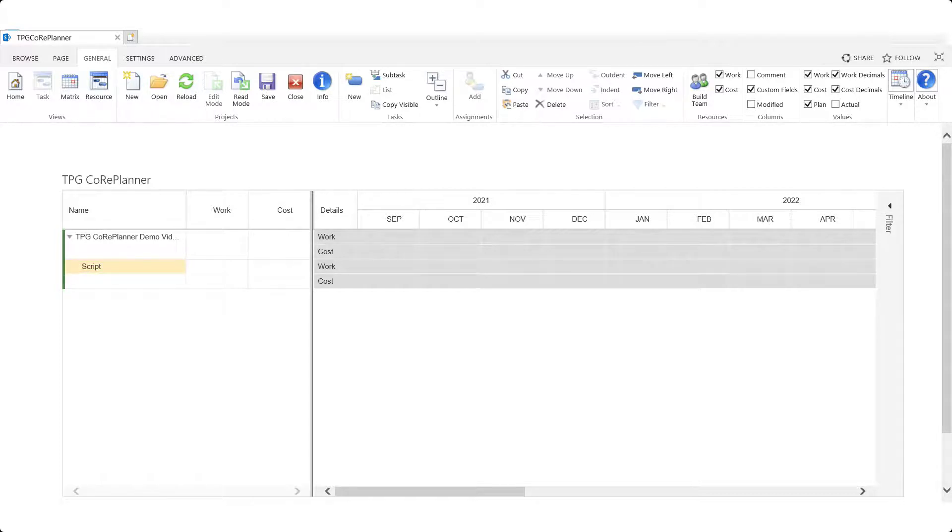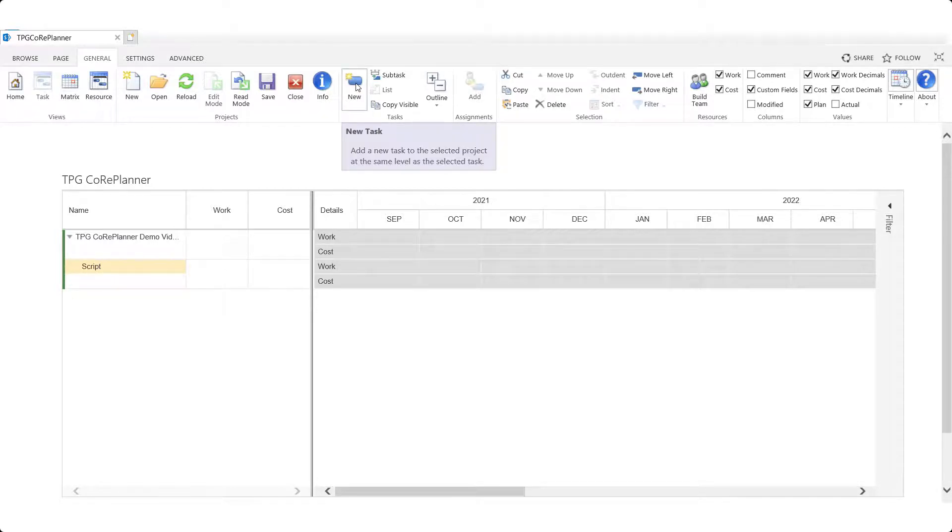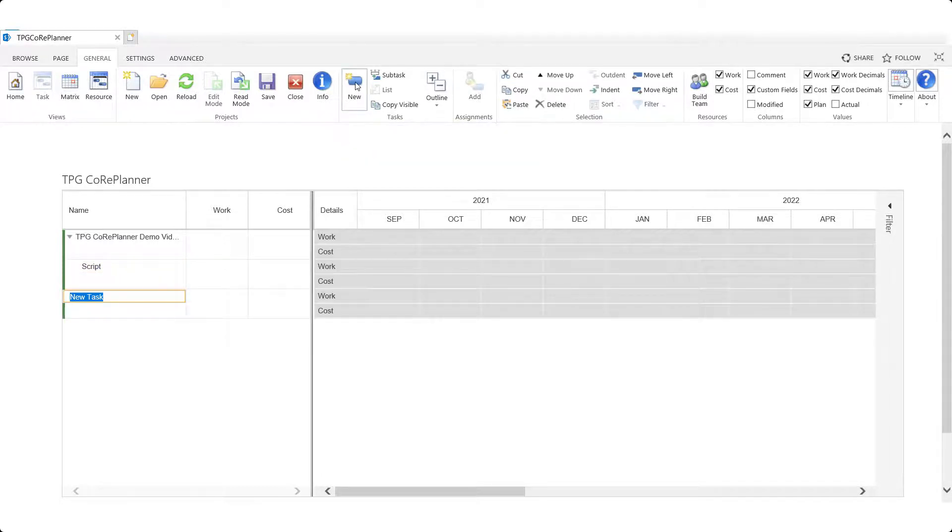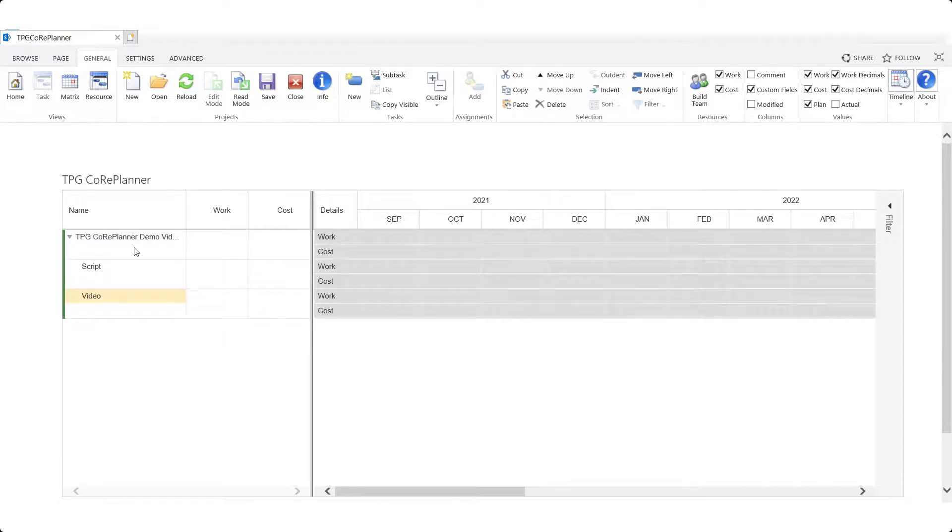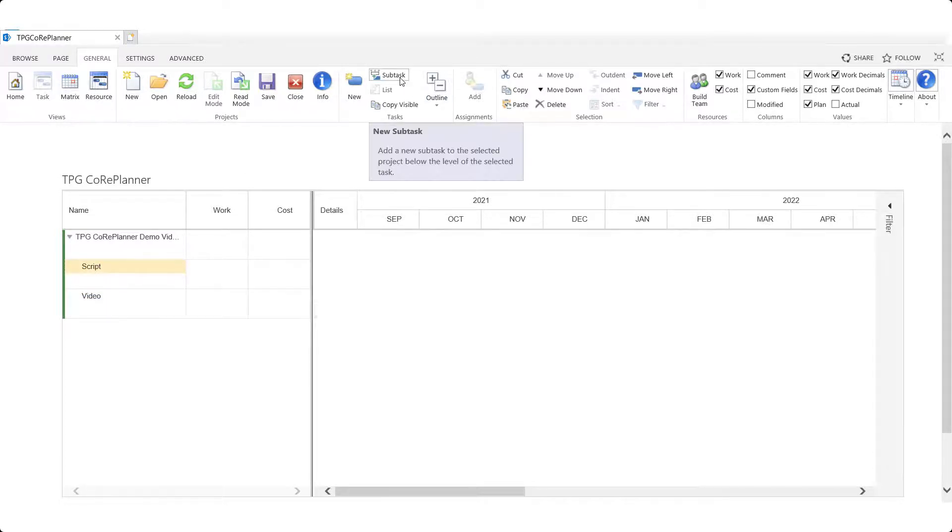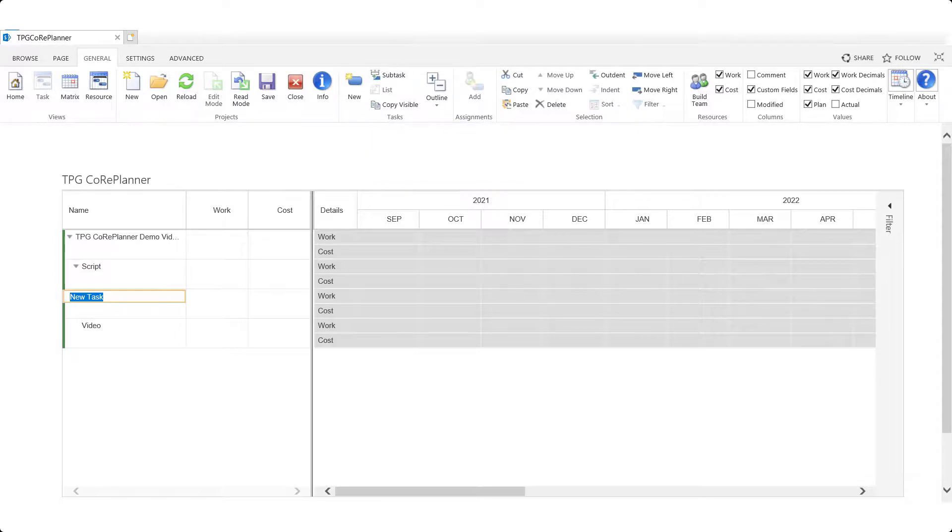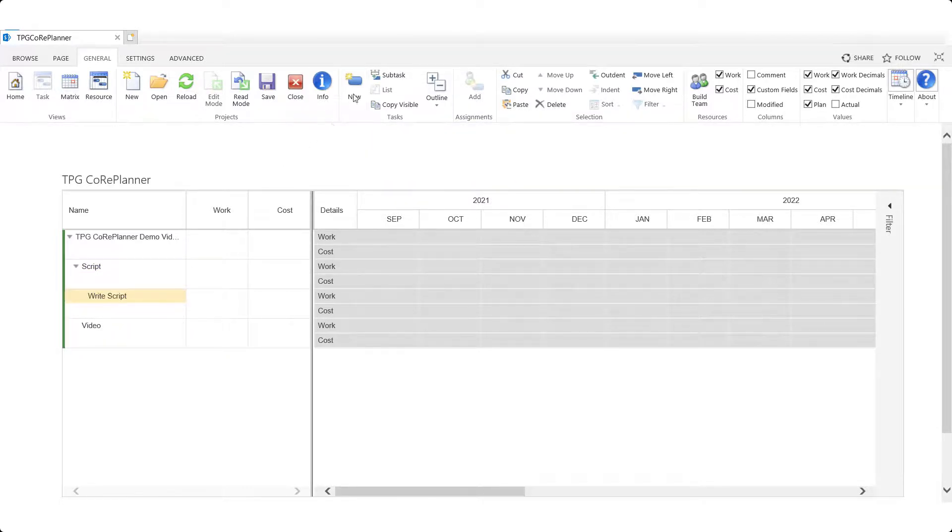To add other tasks at the same work breakdown structure level we can click instead on the new button also found in the task group. We can also add subtasks under selected tasks. This is the way to create a project structure with different levels of summarization within the project.